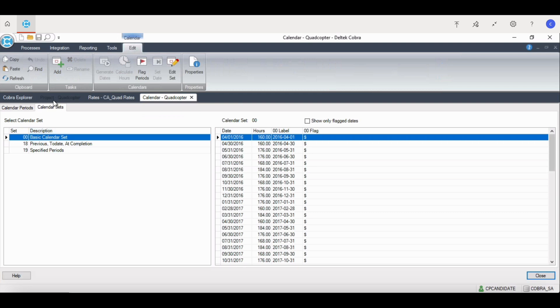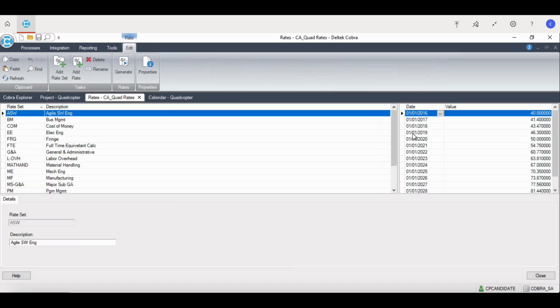It's also used to define the productive hours defined by the organization to produce full-time equivalent calculations. While the calendar can be used across multiple projects, it is not recommended, and a new calendar file should be created for each individual project.